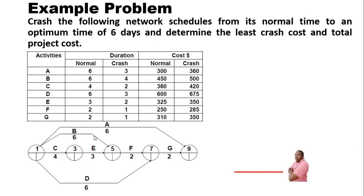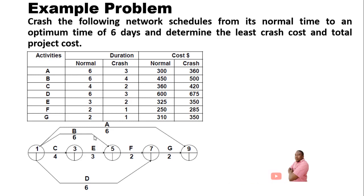Now let's focus on the problem we are going to use to demonstrate how we can perform project crashing in Python. The problem states: crash the following network schedule from its normal time to an optimum time of six days, and determine the least crash cost and the total project cost. The information given is a table with normal duration, crash duration, normal costs, and crash costs, along with a network diagram representing the problem.